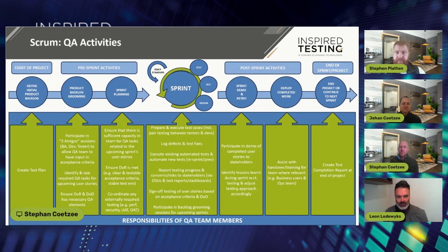But just a quick question on logging of defects. So I heard that you spoke about that, and there's sort of two schools of thought. One is if a bug is raised, it's prioritized and it's fixed in sprint. Using that principle of Scrum in terms of delivering something which can be released after every sprint. Now, if you don't fix that bug in sprint, then in my mind, you're creating technical debt because you can't release after every sprint because there's something outstanding. Unless, of course, the business accepts that risk around that defect and they're happy to go live.